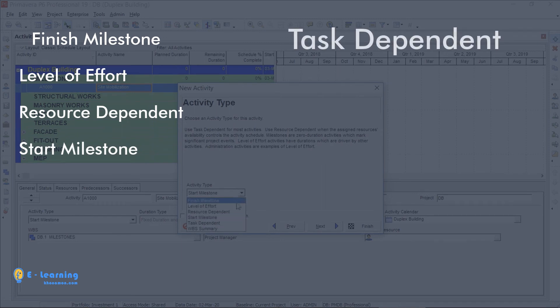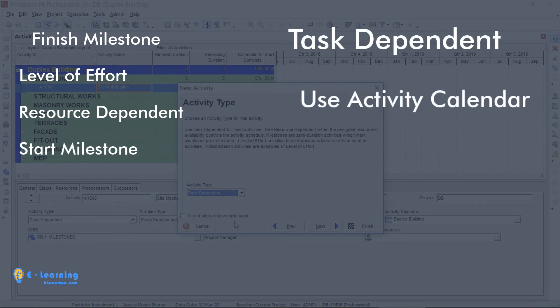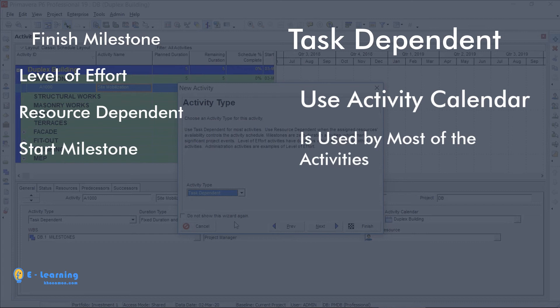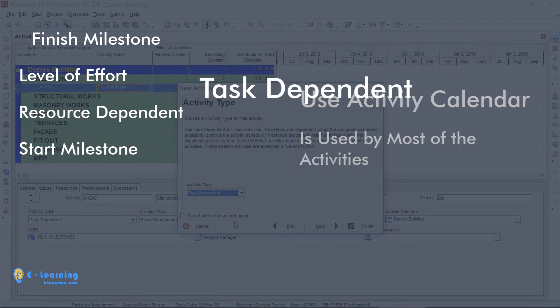Task-dependent uses the activity calendar and the finish date of an activity is calculated according to this calendar. Most of the activities are task-dependent.